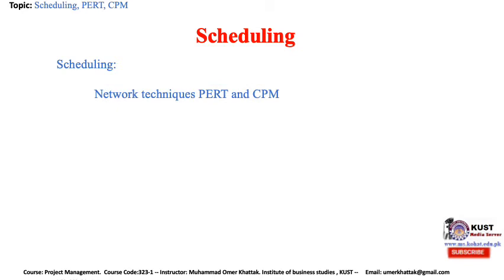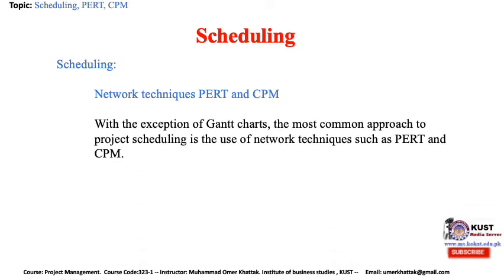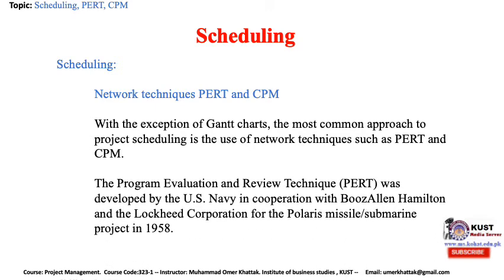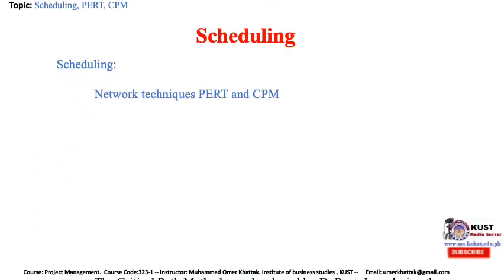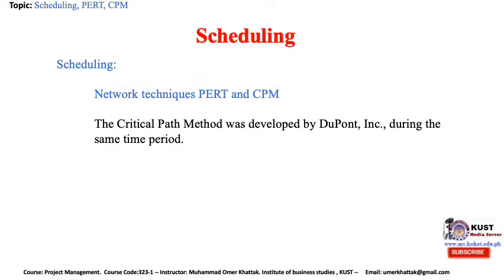Network techniques: PERT and CPM. PERT is Project Evaluation and Review Technique and CPM is Critical Path Method. With the exception of Gantt Charts, the most common approach to project scheduling is the use of network techniques such as PERT and CPM. PERT was developed by the U.S. Navy in cooperation with Bruce Allen Hamilton and the Lockheed Corporation for the Polaris missile submarine project in 1958. The Critical Path Method was developed by DuPont Incorporated during the same time period.